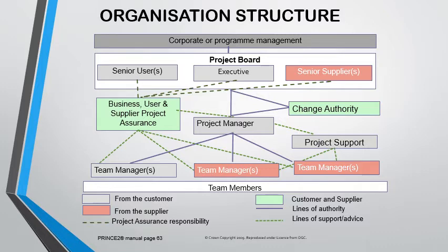We have the change authority who come on board on behalf of the project board to help manage handling of certain issues on the project in the absence of project board members. And of course, we have the project support who comes on board the project to assist the project manager in handling clerical and some research duties. Let's take each of them one after the other. But before we move too far, I'd like to mention this.